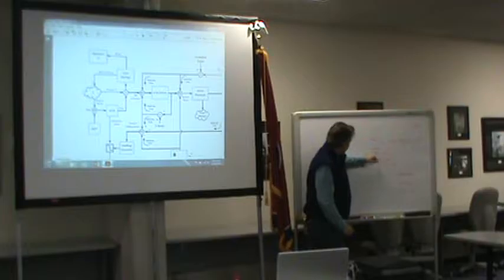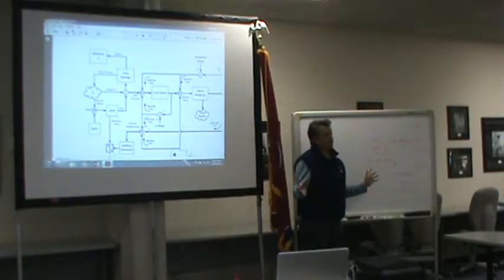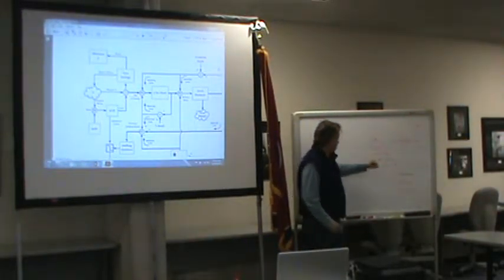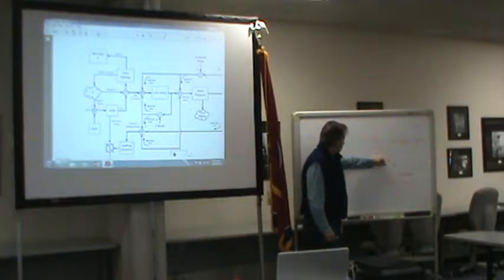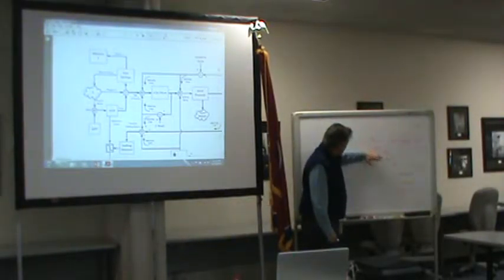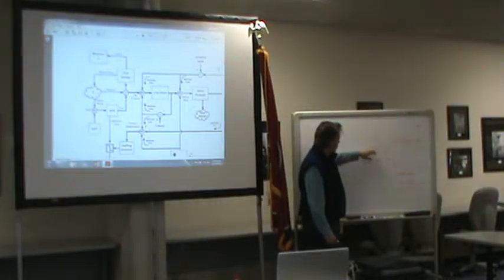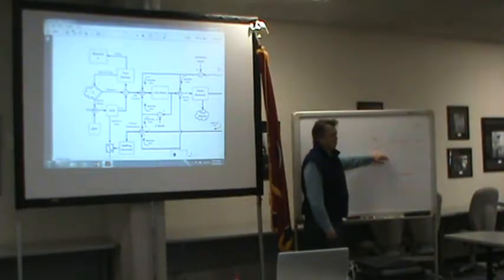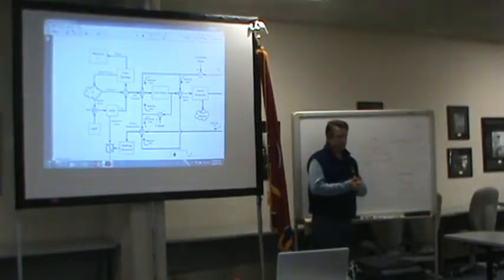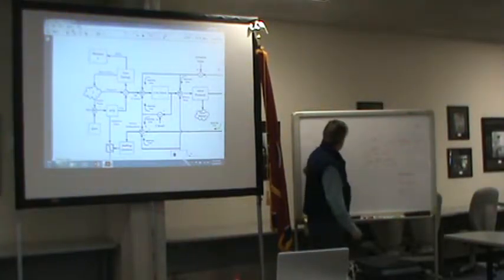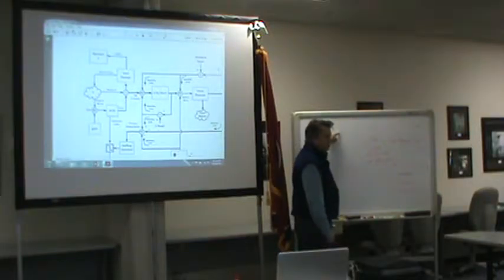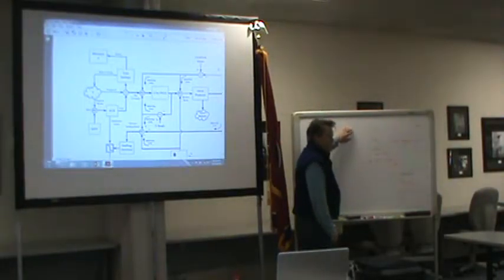And you start to drive this down to the different subsystems, and then you turn your designers loose. Designers say, okay, here are my allocations. I've got to be interoperable with this system. They get together and say, here's how I'm going to communicate with you. As that's designed and built, you now have very specific requirements, all in a traceable hierarchical fashion, so that you can ask whether each subsystem is delivering. As I integrate them together, do they play nice? Do they deliver what we wanted at the end? So you're going down and back up the systems engineering V to build a highly complex system.